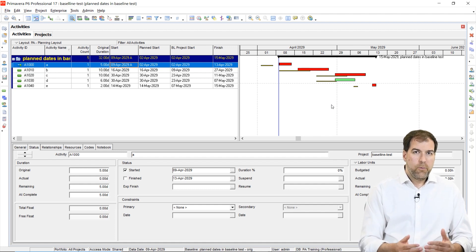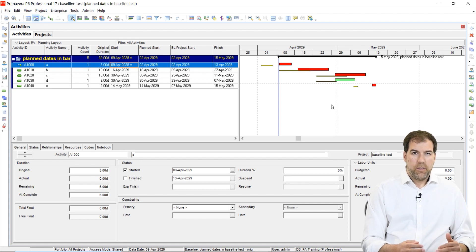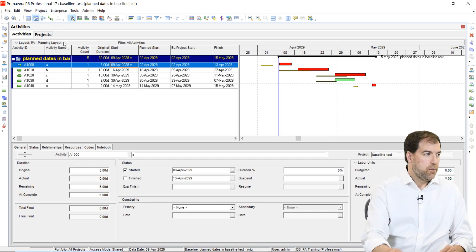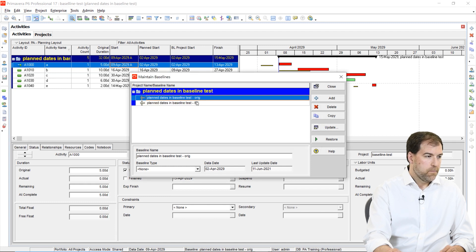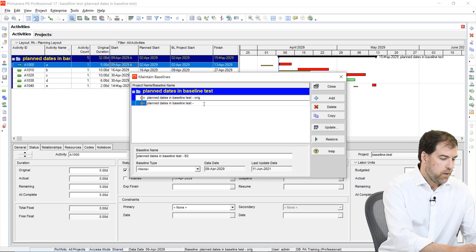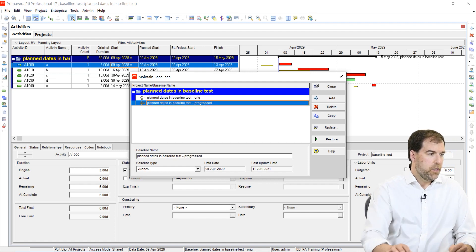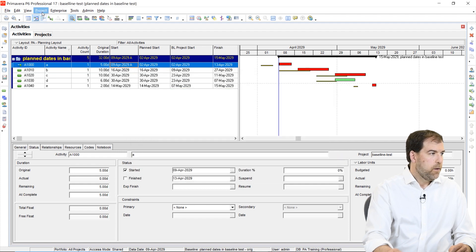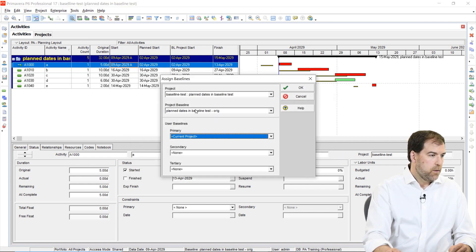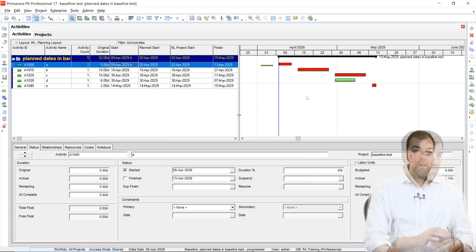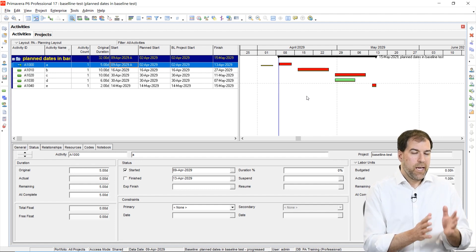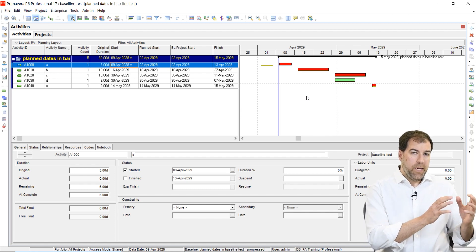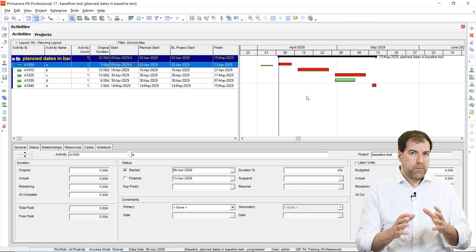So what I would probably do is I would create a new baseline to capture the new dates. So let's go ahead and do that. Let's go to project, maintain baselines, and we're going to add another one, create, just create a copy of the same one. And this time we're going to say, progressed. I just want to differentiate between the original and a progressed baseline. And again, I'm going to assign it to my project baseline. So something happened already, and I don't know if you noticed it, but have a look at the Gantt chart.